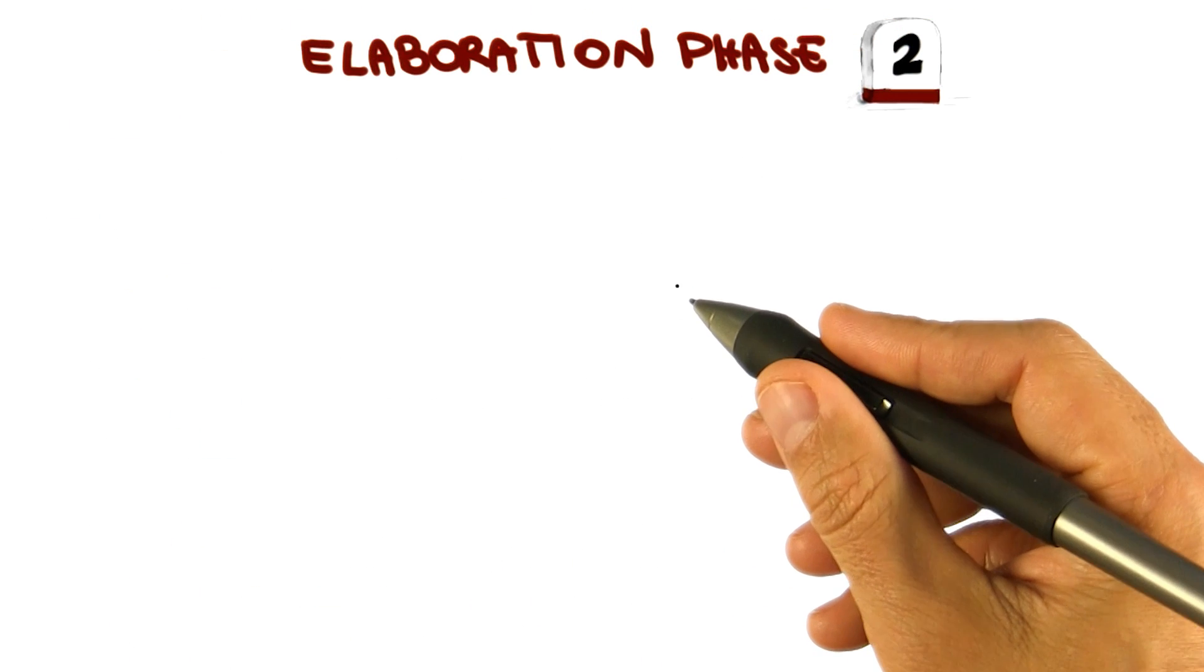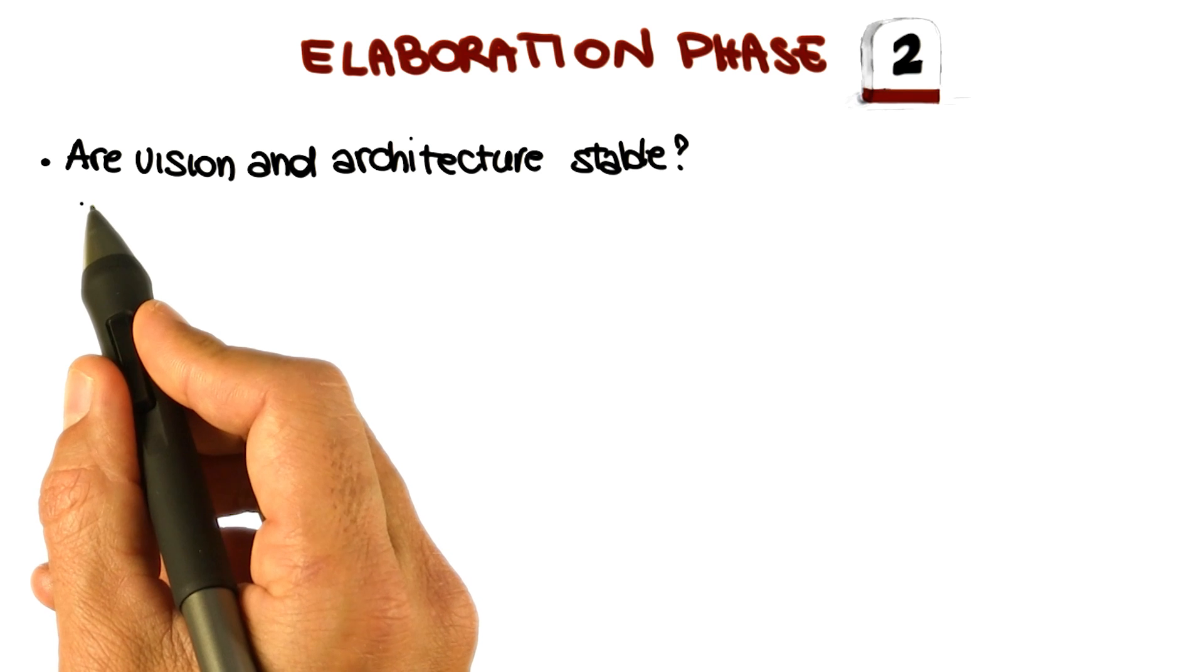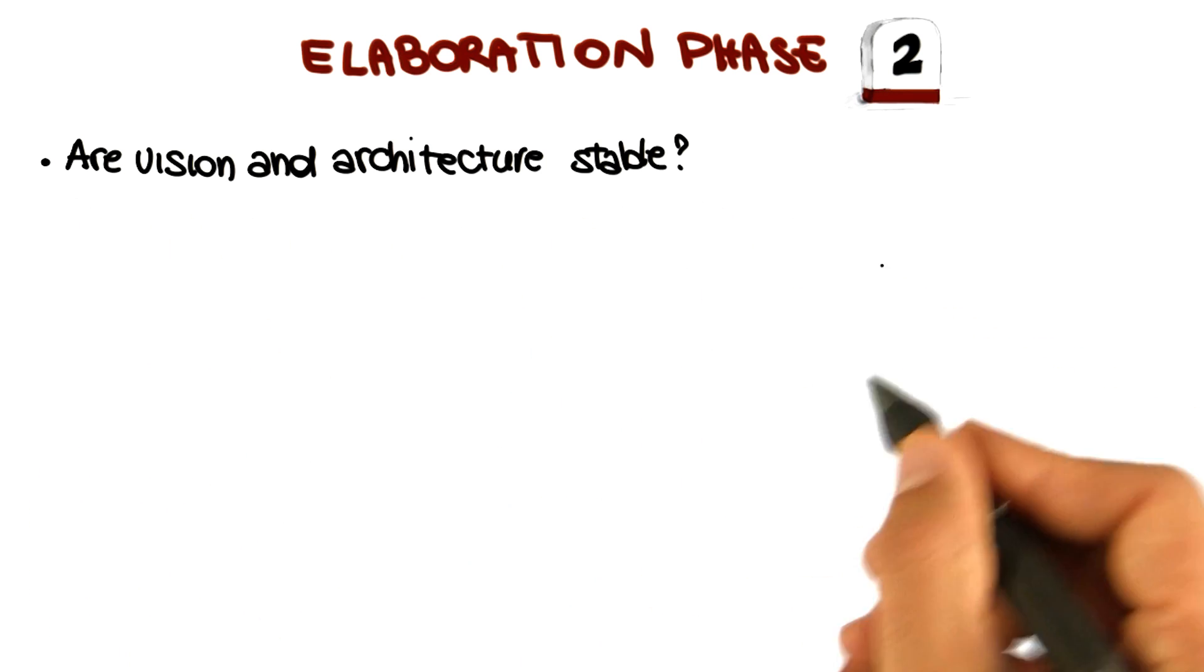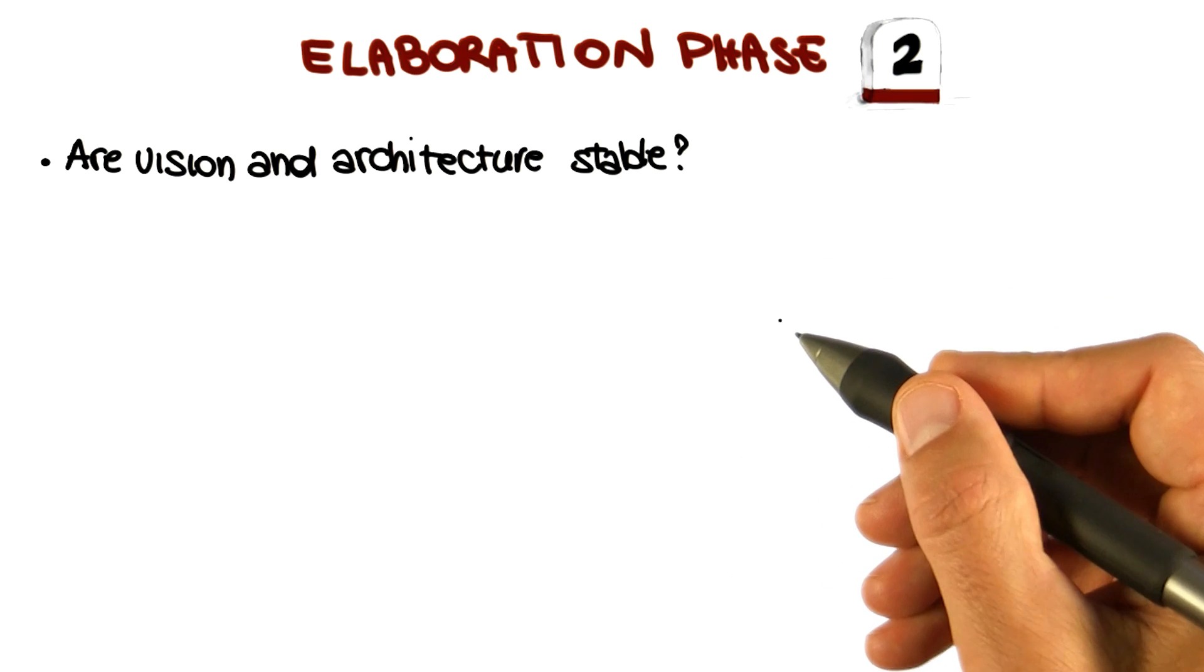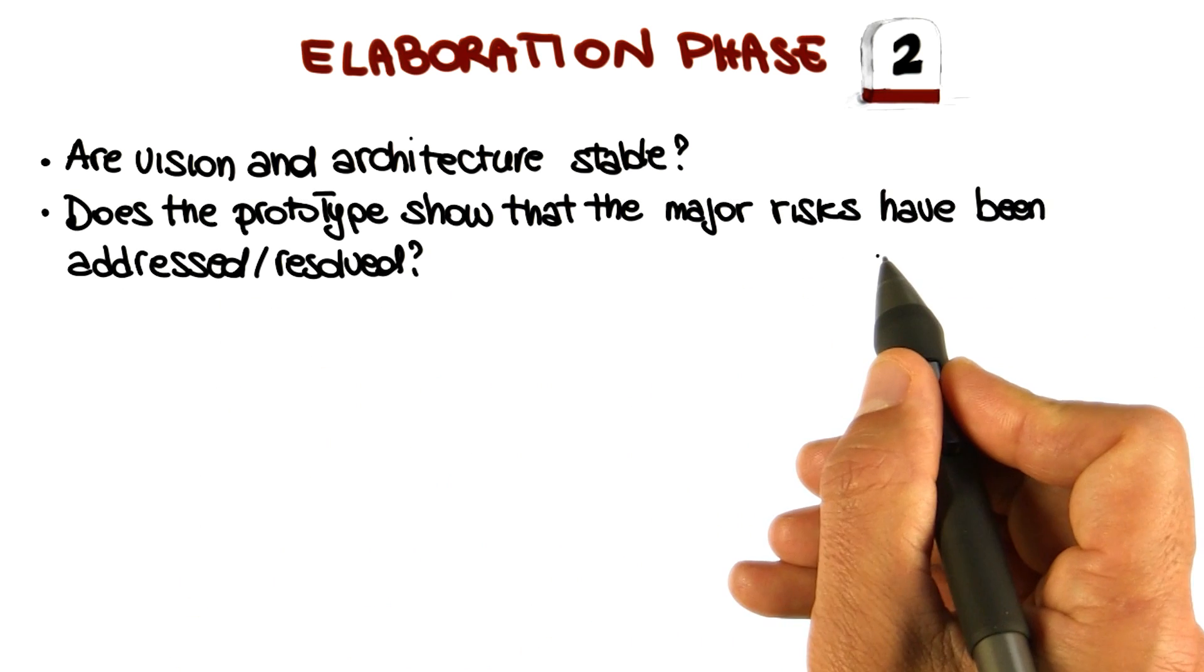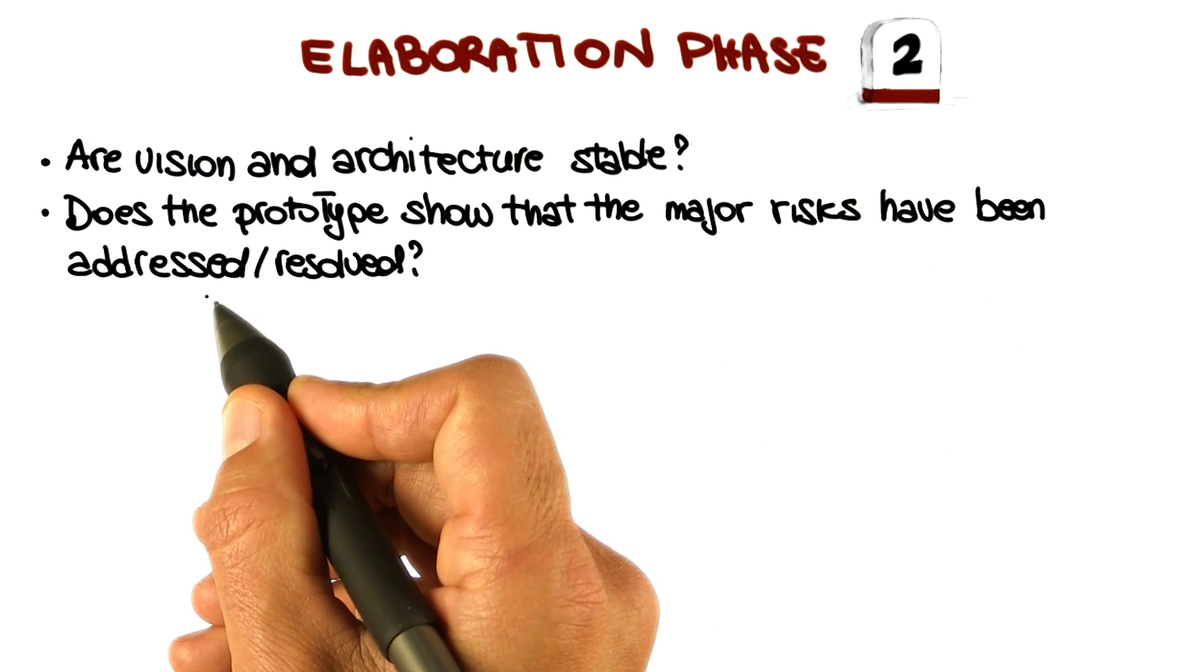Now let's see what are the evaluation criteria for the elaboration phase, which is our second milestone. The first one is whether the vision and the architecture are stable or they're still changing. Did we converge into a final complete vision for the system? Does the prototype show that the major risks we have identified have been resolved or at least addressed in this phase?